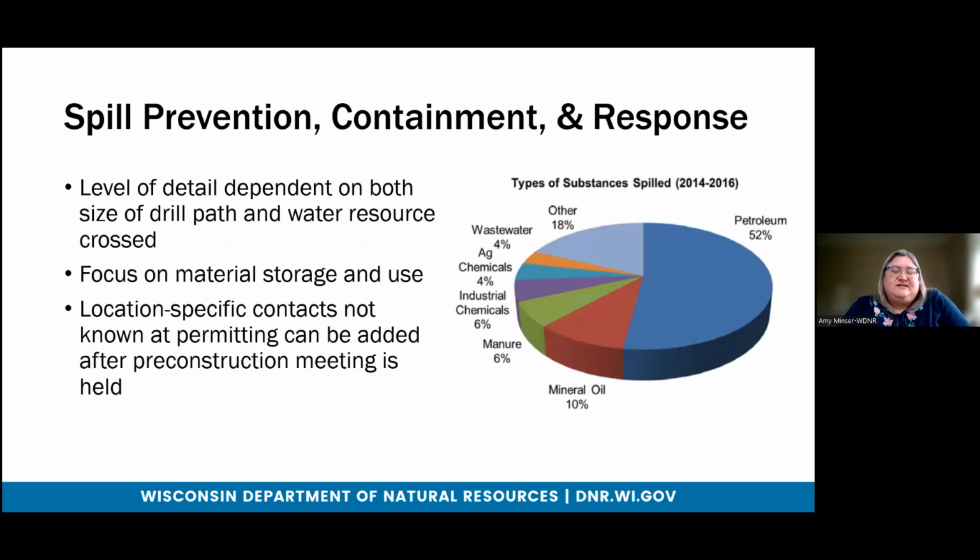Spills prevention, containment, and response. This is really focused on material storage. I'm not going to focus too much because this is something we routinely see in our applications already. Just note here something I found on our spills website, that one of the biggest issues with spills is petroleum products. So as you're doing the spill plan, think about how to prevent spills when you're fueling equipment.